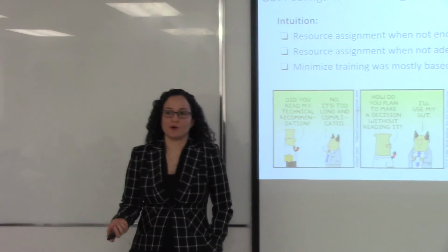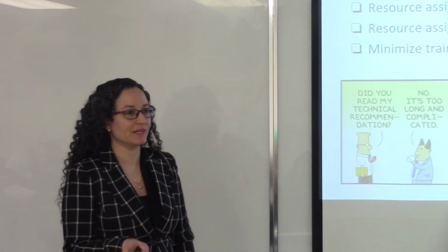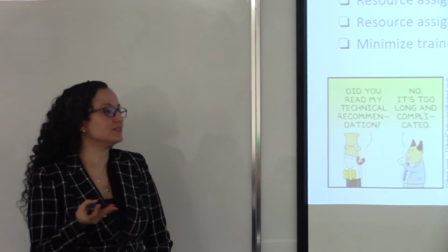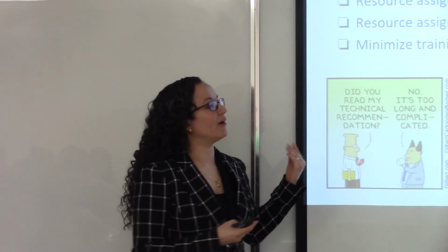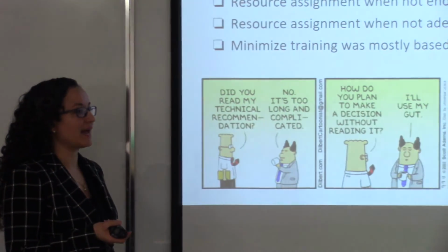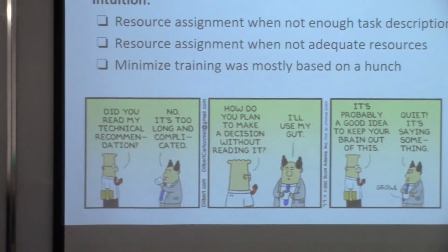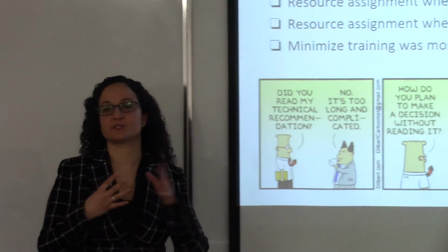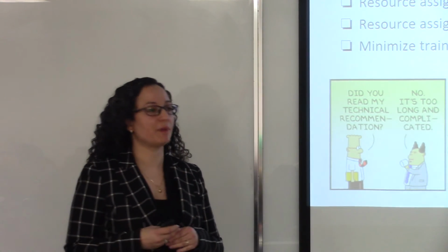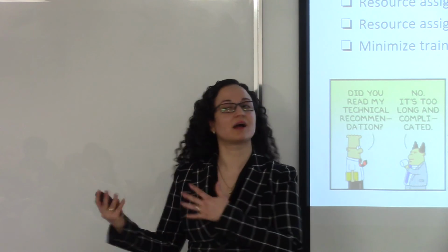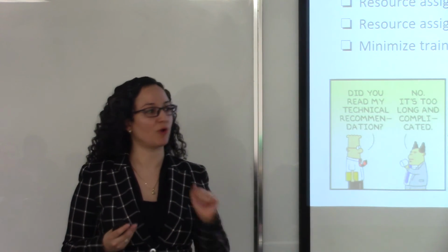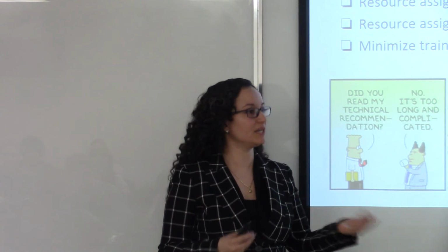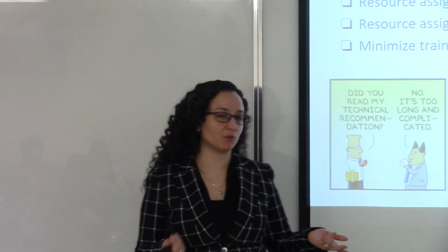Basically, our decision approach was based on which information was available, and whether that information was accurate and detailed enough to make a decision about it. We use our gut feelings for decisions like assigning a task that was not clear enough and the description was not sufficient, or assigning a task when we don't have a perfect resource match for that task. For example, the inspection task in several rounds, we discussed, should we assign a project manager or should we assign an expert resource, so a plumber or electrician. In our case, we assigned the project manager and the resource was pretty good.